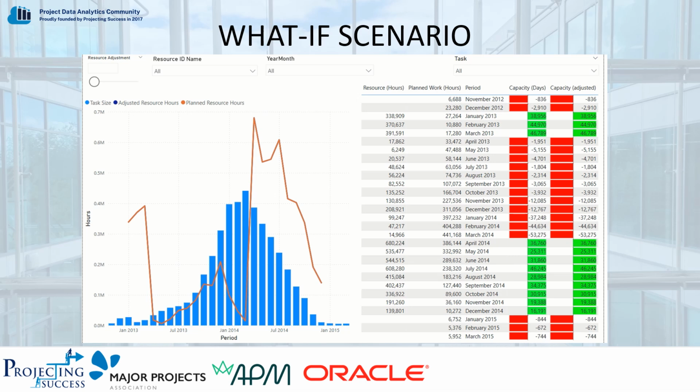In addition to real-time updates, we have used Power BI to provide what-if scenario planning based on reviewing the resource demand and adjusting the capability required. We found in the data that many of the resources were already stretched, which would mean that the scheduler should already be looking to reschedule the project. Based on this data, the what-if scheduling would support understanding how many additional resources would be required if available, or the tasks that are impacted and need replanning if not. Here is a short video to show you how this is done.